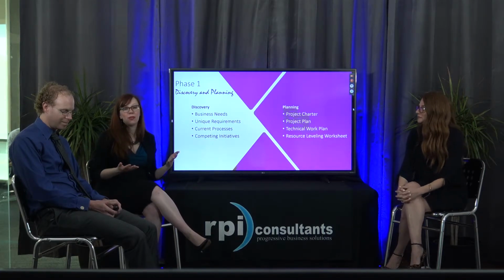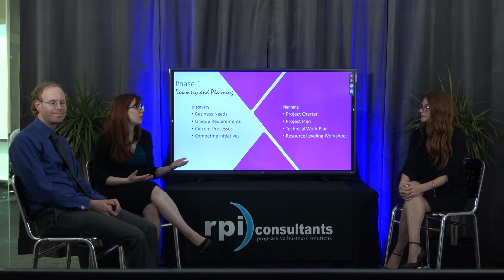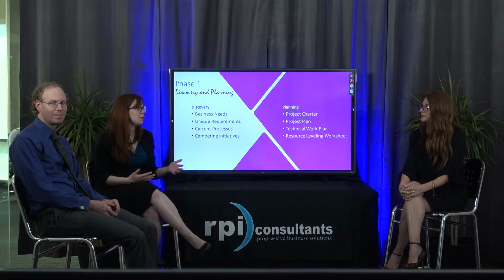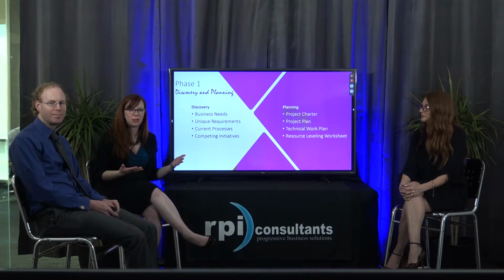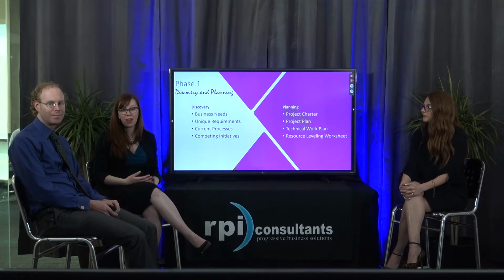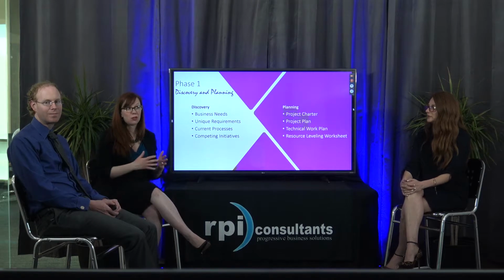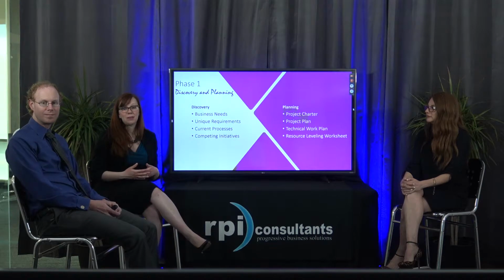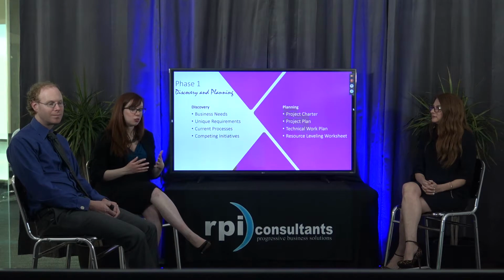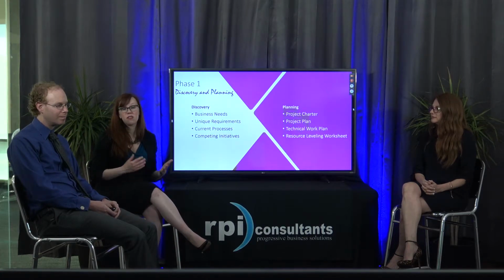Yeah, and often the way we approach it is concurrently while we're doing this early discovery, we're in the midst of project planning as well. They seem to really dovetail into each other. And so some big deliverables that you can expect from project management as the result of project planning would be your project charter, which is usually a 30 to 40 page document that in detail roadmaps really the whole engagement from start to finish. It looks at the various phases. It will outline project scope to the level of which modules we've individually decided are in or out of scope.